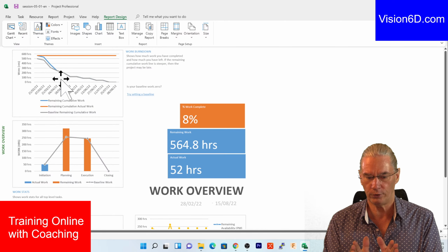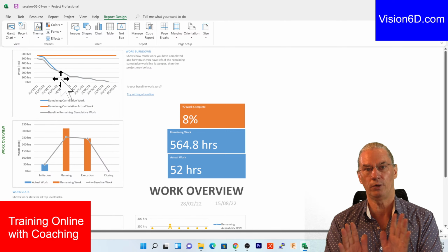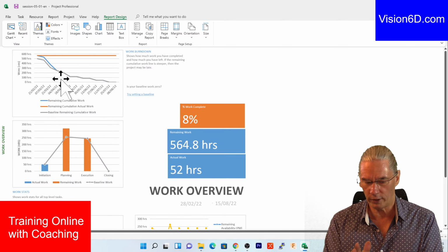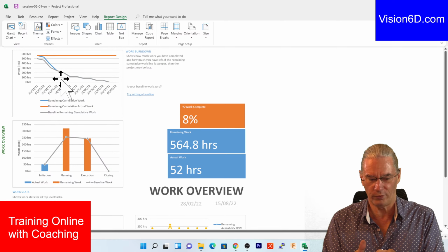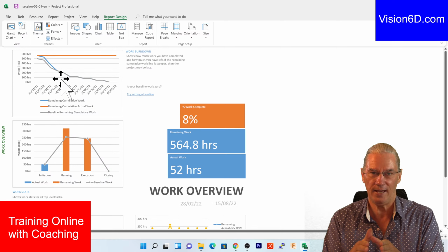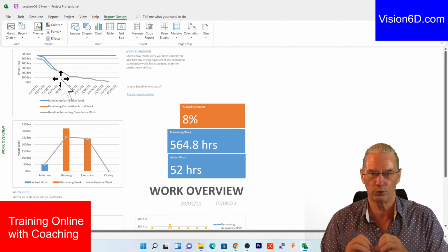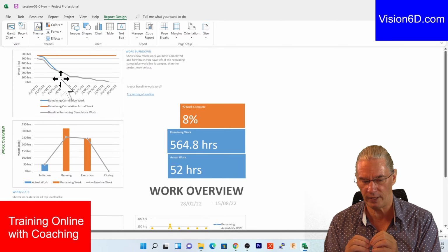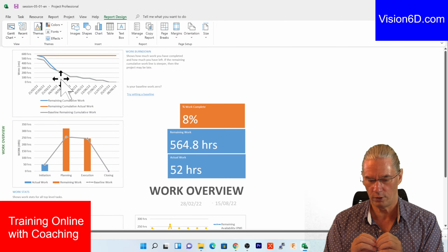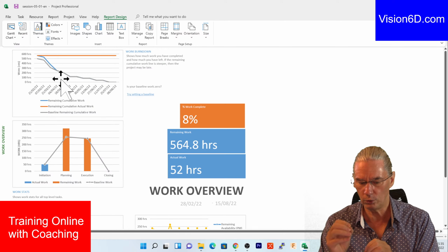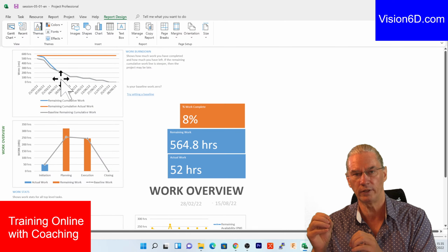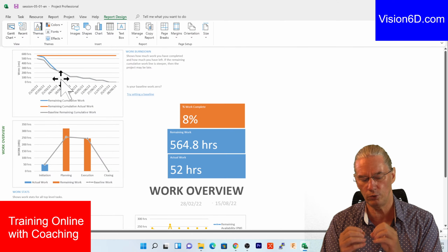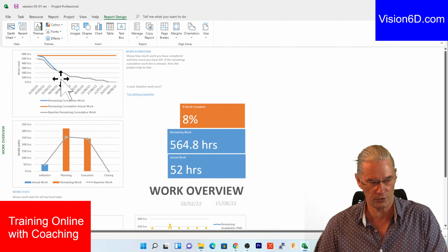So either you really know really well your project and you are able to do that, or you've brought a lot of changes and then it's really difficult to find the right explanation. So my advice is, like I'm doing now, do one change, go and look. Do one change, look at all the different reports to understand, to be sure that you understand your changes.